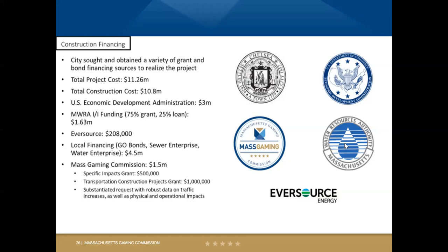And so, carefully tracking all of these expenditures within the construction program is something that's really important. If you're considering utilizing Mass Gaming Commission financing, you need to make sure that you're prepared to track all of the expenditures throughout each of those elements of your project that you applied for.